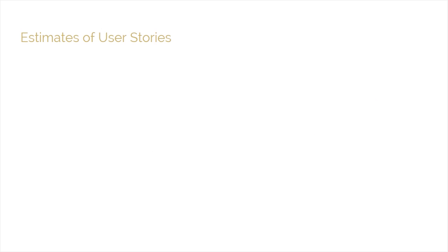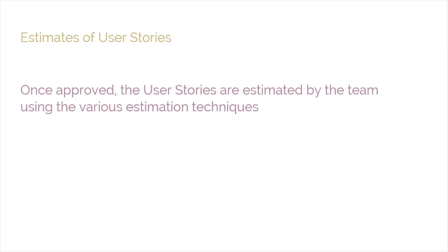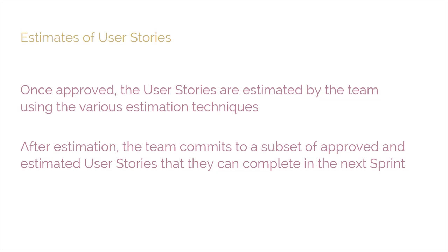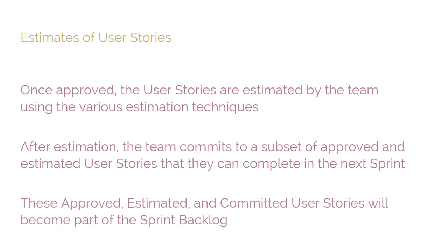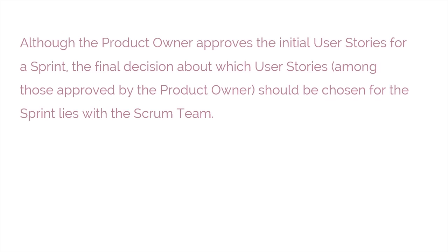Once approved, the user stories are estimated by the team using various estimation techniques. After estimation, the team commits to a subset of approved and estimated user stories that they can complete in the next sprint. These approved, estimated, and committed user stories will become part of the sprint backlog. Although the product owner approves the initial user stories for a sprint, the final decision about which user stories should be chosen for the sprint lies with the scrum team.